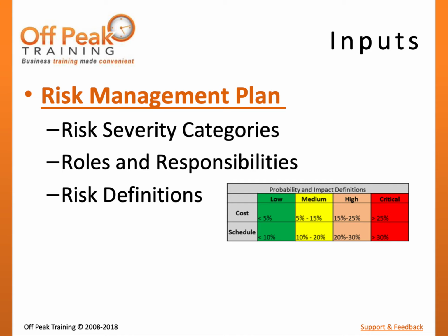For this process, the definitions of probability, impact, and urgency will be important. Since the tools and techniques will include probability and impact analysis and matrices, a description of how these tools and techniques will be used should be provided. For example, on what scale will impact be evaluated? A scale of 1 to 5 or a scale of 1 to 100?